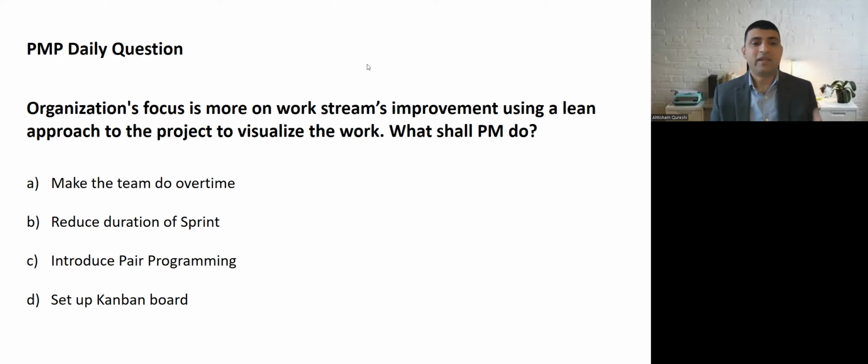So let's see. Make the team do overtime. Overtime will increase the productivity for a shorter duration of time. But for the longer period of time, it actually dips the productivity, as well as the morale of the team, and it's not an efficient way to improve the work stream. Secondly, it is not going to help us to visualize the work. So that's not our answer.